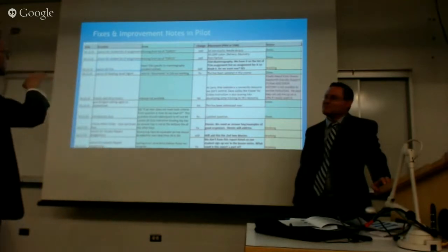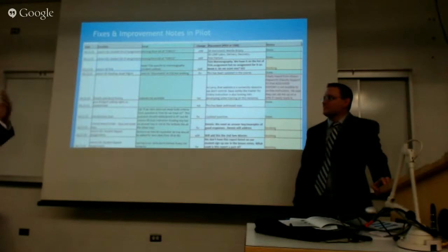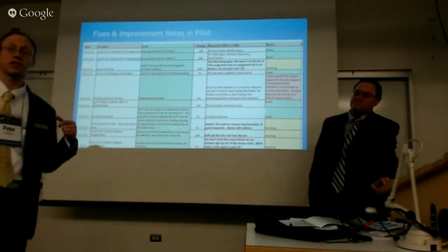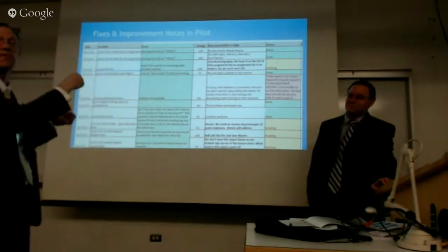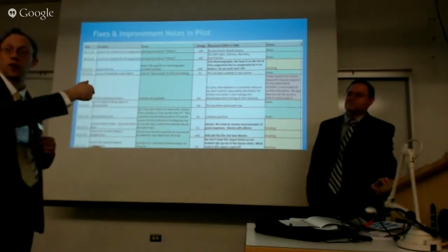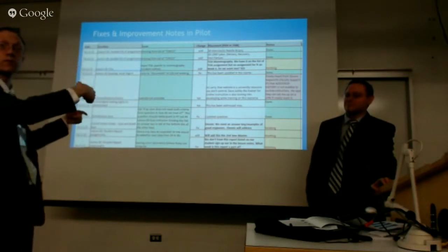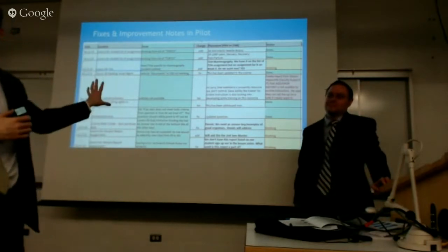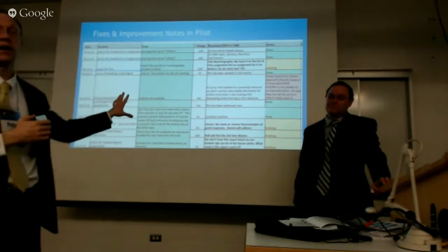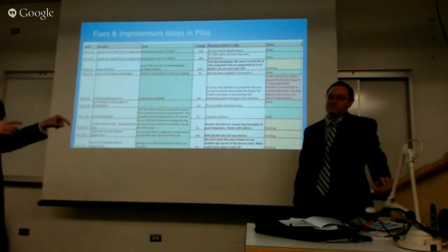And what this is, in those weekly meetings as we pilot, we try and bring up, what are the issues that we've seen this week? As you look to next week, what can we do to help you? And we try and note those issues and then prioritize them and figure out what gets changed now while we're in the pilot, and things go on our list of priorities to submit as improvements for after the pilot. So that's one thing that we're doing to try and work on keeping track of issues in a way that we could share with others.